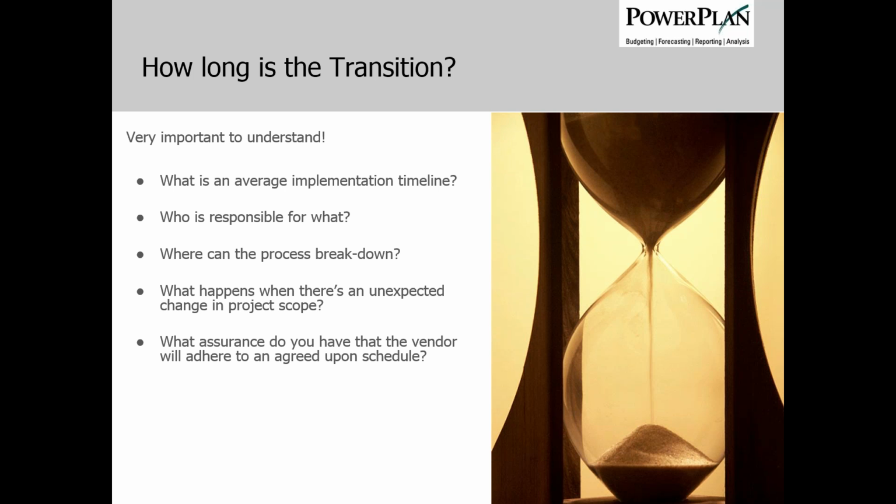Where I have seen breakdown is when there are key project resource issues, unavailability at critical project points in time. So I think it's important for you as the customer to work with the vendor to be flexible and to develop a project schedule and a timeline that really works for both of you as a team.